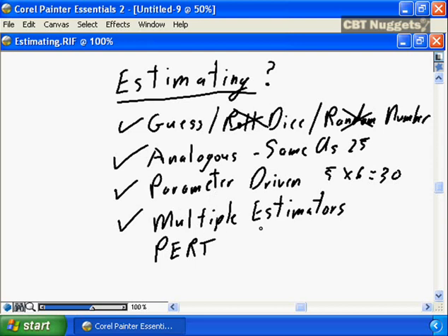You would ask 2 or 3 or 4 people to go away and develop estimates for these work breakdown structure elements. Go away and develop estimates for this component for my project plan, and then come back and compare and rationalize and develop sound estimates based on the results from multiple estimators. Using an estimating technique such as multiple estimators is expensive in the amount of time and the amount of effort required to use multiple estimators.